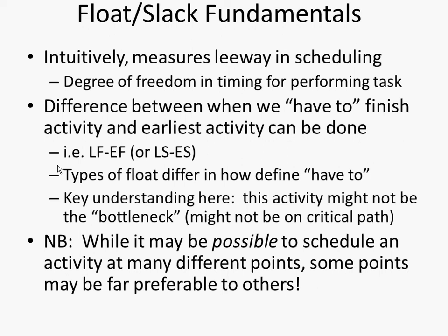0. That's the definition of a critical path: the longest sequence from start to finish of 0 slack, 0 float. We also use the word tasks. Based on the algorithm we saw, there's going to be some path of that, at least one. And you find the longest one associated with it, 0 float, that's going to be a critical path. Make sense? That's how you'd identify it. You'd look for 0 float paths.